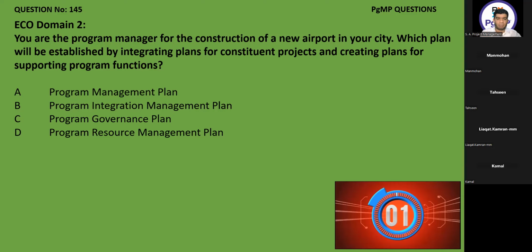The other important thing is that when he talks about a certain type of meeting, it will be a program kickoff meeting, or, as we will see later, a post review meeting where we collect lessons learned. So when he asks about a certain type of meeting, we cannot give a general answer like stakeholder engagement or stakeholder communication. We have to give the exact name. If it is at the beginning, it will be a kickoff meeting. If it is at the end, in the program closure phase, where we take all the feedback, lessons learned, and best practices, it will be a post review meeting.